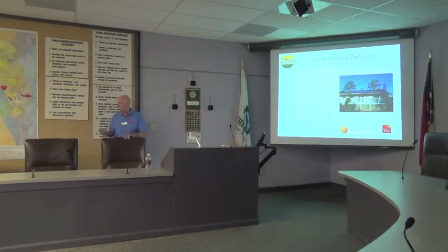It's a simple SketchUp. Particularly, we're going to do a site design if you are in an HOA and you're worried about whether the HOA is going to approve your solar system or not. In most instances, if it's on the back of the house, you don't really have too much to worry about getting approval with your HOA. If it's on the front of the house, a good SketchUp design to take into your architectural review board is a must, and we will help you out with that.